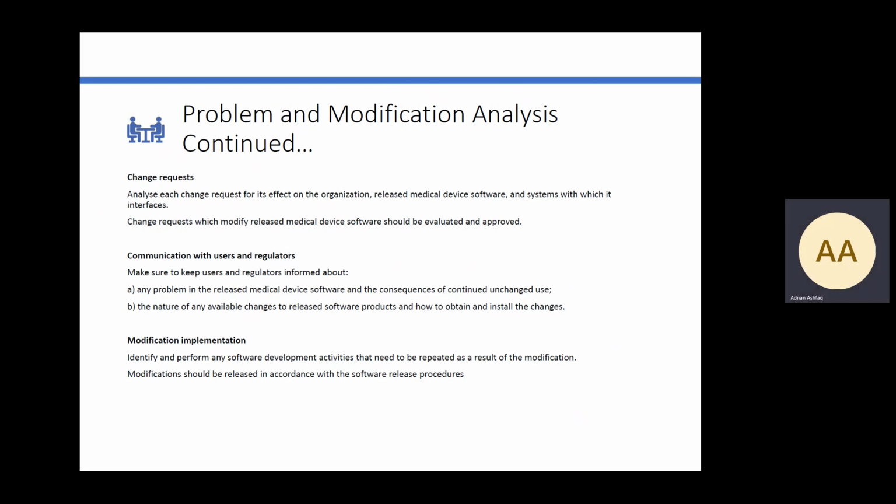Change requests. Analyze each change request for its effect on the organization, the released medical device software, and systems with which it interfaces. Change requests which modify released medical device software should be evaluated and approved.